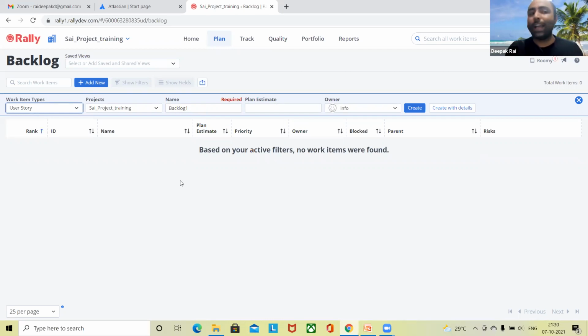If you have any backlog pending and you want to move this user story, maybe you have to partition that user story, and whatever is done, you can complete in the same sprint, and post that you can move it into the next sprint. So here the plan estimates will be done. This plan estimate is totally dependent on your group of members and your team size, and even the delivery of your content.